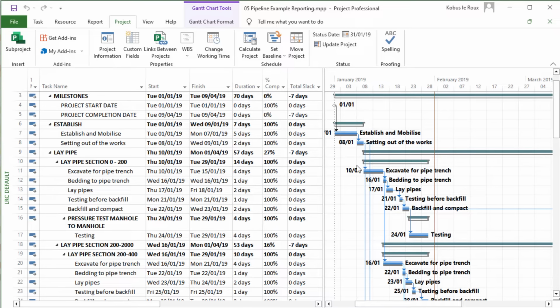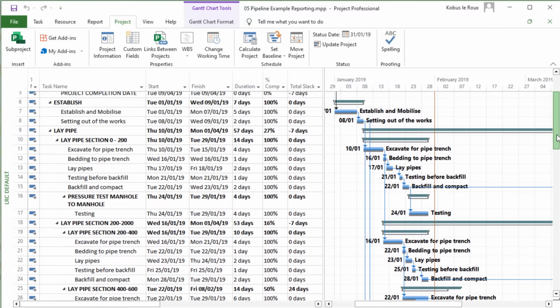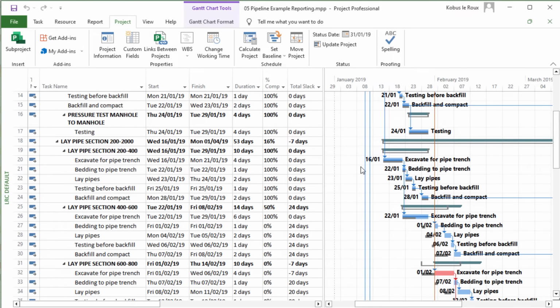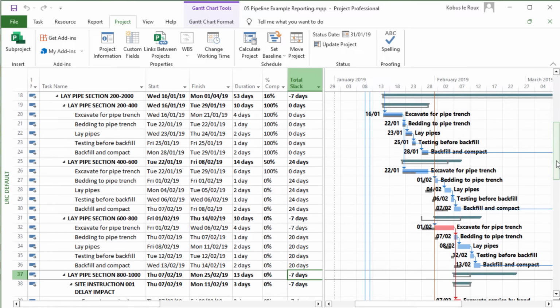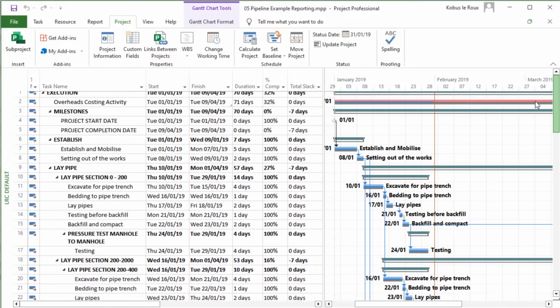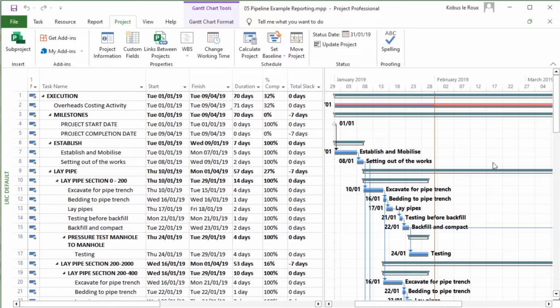You have to have your baseline set. So the formula will not work on those tasks that don't have a baseline, and it will certainly not work if you haven't set a status date. So if you're still unsure how to do this, I won't cover the principles of updates in this particular video. So go and watch some of our other videos, or you can join our specific MS Project course for construction and engineering professionals, where we plan this project and I'll show you step by step how to update and do a proper update.